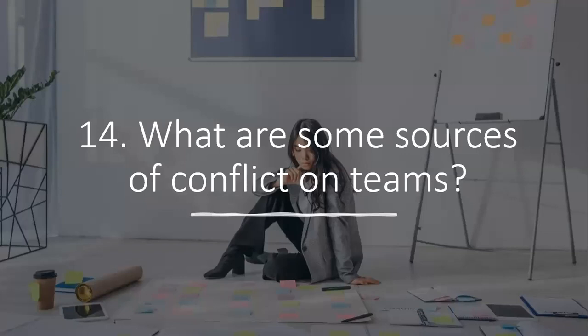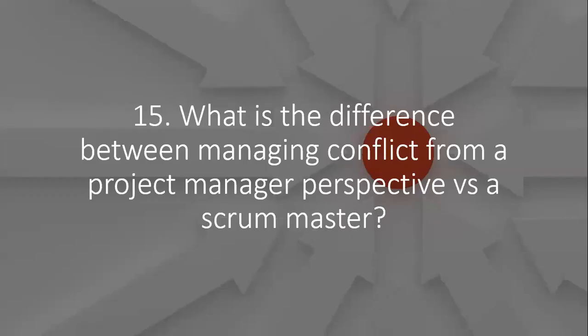Well, sources of conflict include scarce resources, scheduling priorities, personal work styles. Contrary to what a lot of people think, it's not personalities first. Could personalities play a part? Absolutely, but it's not that first and foremost. We could have things such as how people think and reason and work styles and things like that, okay? So team ground rules, group norms, and solid project management practices like communication planning and role definition reduce the amount of conflict.